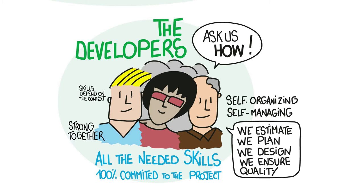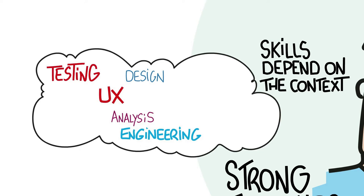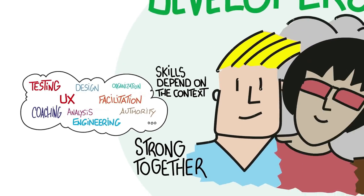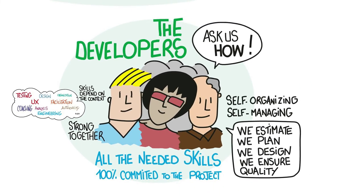The skills needed depend on the problem to solve. For software products, this often includes user experience, analysis, design, engineering, and testing, and may involve multiple different technologies. For organizational transformation, the skills may include coaching and facilitation, knowledge of the organization, authority to change the organizational structure, and access to senior leadership. The developers estimate the work because they do the work, and combining these estimates into schedules, release plans, and budgets is usually handled by the product owner.